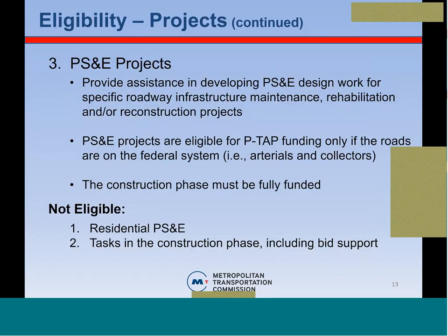We also have design projects. A warning about design projects: if you have local money for a design and you use this funding source for us to help you create a design, it's going to federalize your project. So if you have federal money to do a design, then I highly recommend that you come to MTC and apply for a PSNE project.